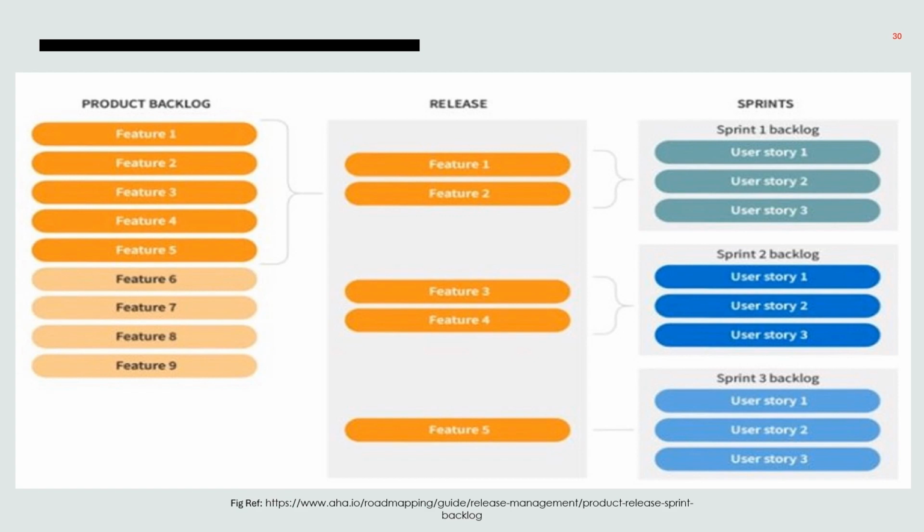And next, moving to sprint, it contains user stories that need to be completed in a specific period of time. User stories are estimated in story points. The development team uses the past velocity and current velocity to determine story points assigned to a story.